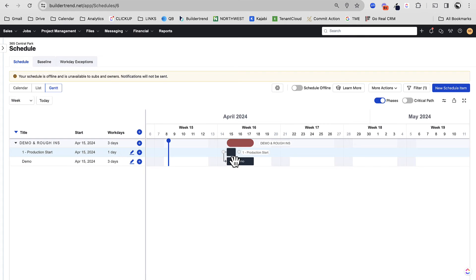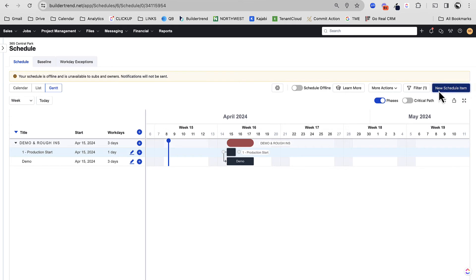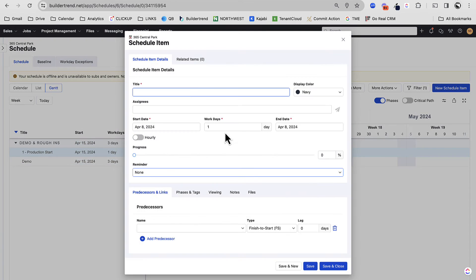Now why I love doing that is that when I move this production start out or in, it's going to bring the entire piece with it. And then we're going to have items that are dependent on demo items that are dependent on those items, et cetera. This makes it really dynamic. If anybody's ever scheduled on a whiteboard, you know the pain of creating the schedule and all these dependencies, and then something changes, you have to erase the whole thing. And that can happen within seconds.